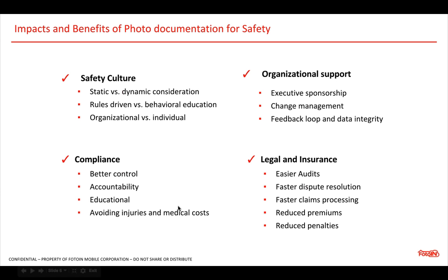They had a homemade doorstop, a rope probably from Home Depot, and the superintendent really had to react because it was obvious that the crew was not trained properly and didn't have the right tools to get their job done. He ended up sending them home, and you can immediately imagine the delay in the schedule, and the discussion with the foreman and the owner of the company that crew was working for.